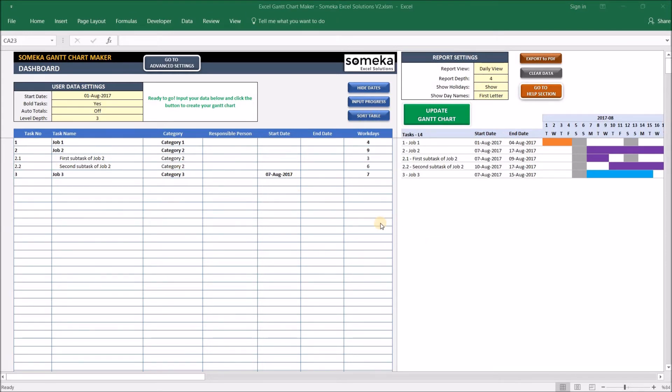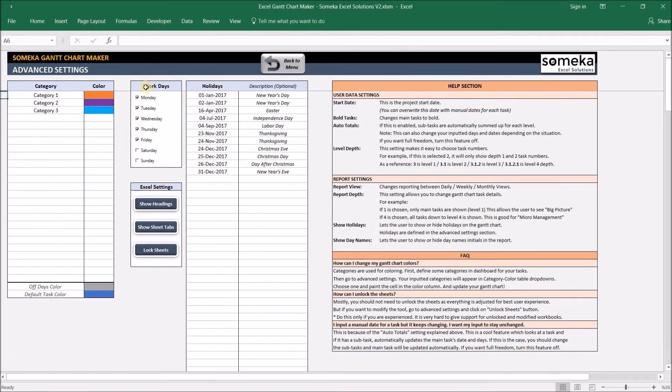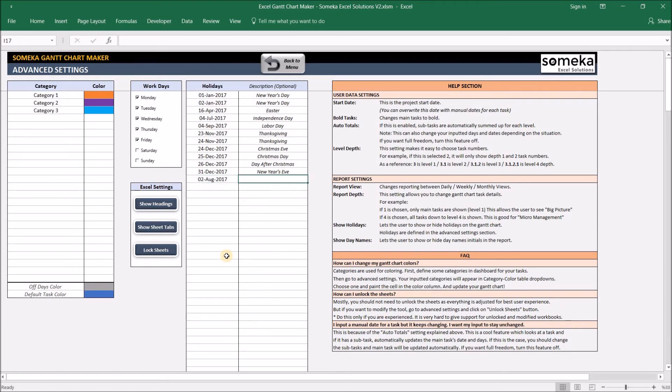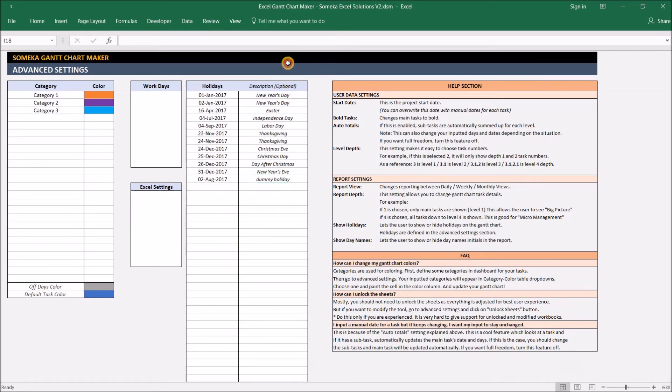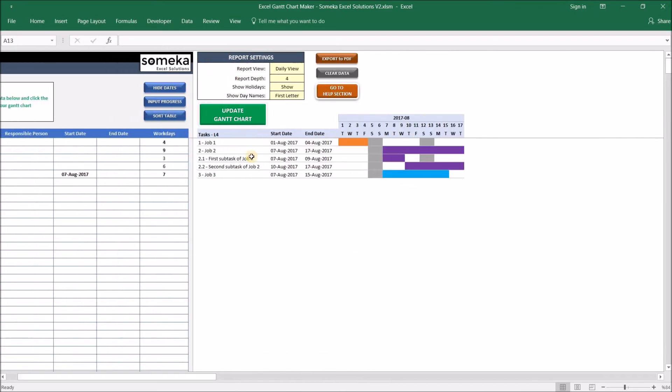Okay, now another cool feature of our Gantt Chart Maker tool: defining holidays and off days. You know, not every business works on the same days, so you may want to change the holidays for your own business. This is managed in the Advanced Settings. Let's go there. Okay, the Work Days and Holidays. The first section is the standard weekly work days. So for example, I can make Tuesday an off day as well. I'll change it back again. And the second section is national holidays or some specific dates on which your project will be on hold. For example, if I enter here the 2nd of August as a holiday, and let's say Dummy Holiday, and I go back to my Gantt chart and update it, you see the 2nd of August is also a holiday and each task has enlarged one more day. This is a great feature for the most accurate project time management.